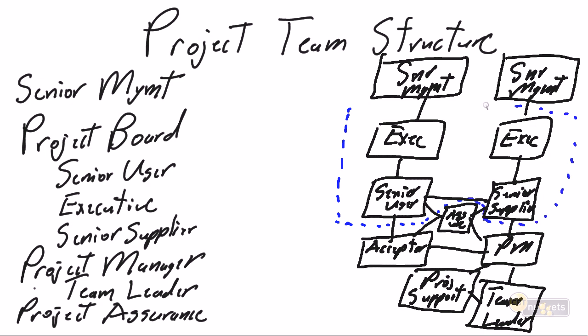for all intents and purposes, this particular group right here, where we have our business executive, we have our senior user, and we have our senior supplier, and I've thrown an additional member of the project board in. I'm going to say this is optional, but I would typically throw in a senior executive from the supplier organization as well, to ensure that we have equal and fair representation on the project board, but again, on a purely optional basis.